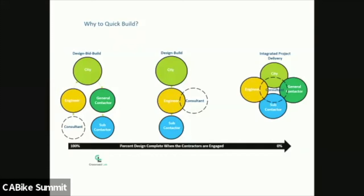One of the ways that building owners deliver projects is design build, where they want to know everything: operations, maintenance. I own this building. The same architect needs to tell me how to replace the windows when they break, and it's full ownership over the building. That's called design build. It's a different type of project delivery. What we're really trying to get at is integrated project delivery, where the city staff is enabled to actually implement this stuff themselves. And it's an ongoing process, because you don't want a consultant who's just the bridge between the community and the city.